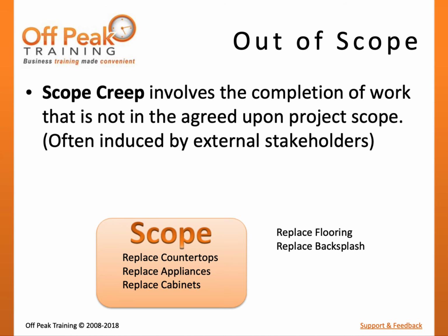Scope creep is a common term used to describe doing work that is outside of scope. Scope creep is usually induced by external stakeholders, such as the customer. They may convince team members that the addition will be small, easy, and very important. Since our team members are trained to ensure customer satisfaction, they may not think twice about incorporating the addition. However, they may not fully understand complications that this may cause in other areas of the project.